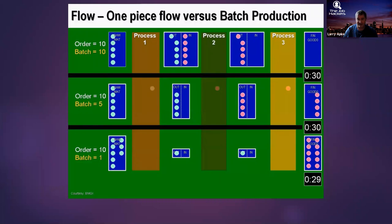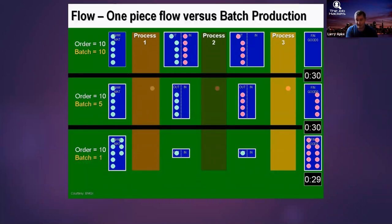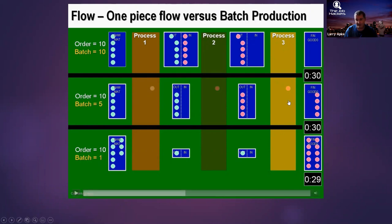Most people batch things intuitively. I used to do this exercise with stuffing envelopes — we fold all the papers first in big batches, then stuff all the envelopes, then address them, then put the stamps on. We intuitively think that's going to get us there faster, or that it doesn't make a difference. What I'm showing here is it makes a real big difference — in the one-piece flow condition, I've delivered all 10 widgets, versus the other conditions where nothing has been delivered yet.